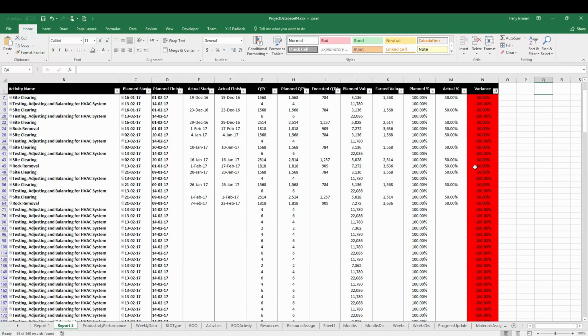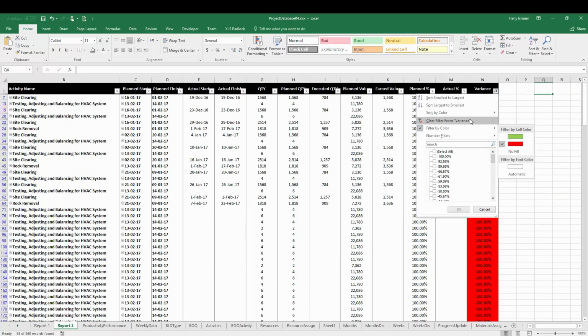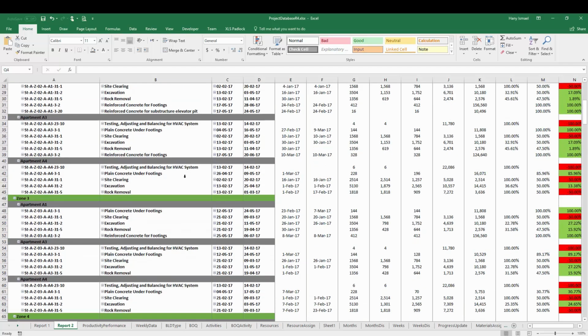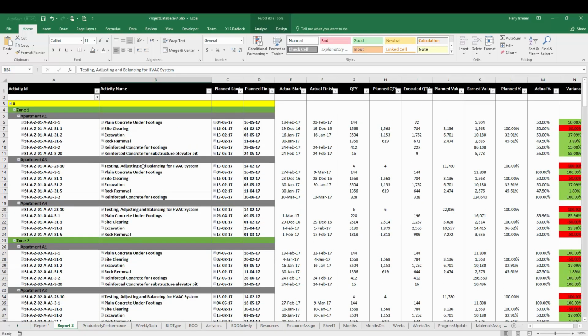Now let me tell you one last thing before ending this video. I can find here some planning mistakes. The planning mistakes I can find from the activities that should be done. For example, here the testing and adjusting balancing and the dates for it. It is obviously wrong. So you have here something wrong in your planning. This should be started at a very early stage compared to the other activities. So this will give you also a chance to review your schedule. Even if you don't have updates, you can play with it, change the dates, change the weeks, and see what the activity should be executed.